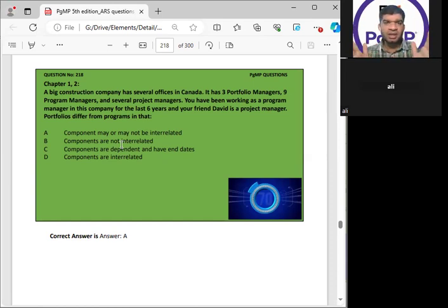Even from a general perspective, just to make it short, normally one program should have a maximum of 3 or 4 components. That's what I tell all my students. Maybe you have 10 per component, but you are overstretching your resources and the purpose of the program. In that case, the best approach is to have program one with only 3 components and a smaller goal, make another program and put 3 projects under it. Once they are finished, make another program having those 3 components as subsidiary programs. The only purpose of following the PMI standards or defining the portfolio and program is not to make something complicated.